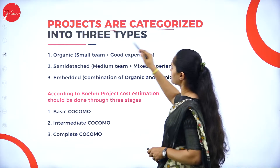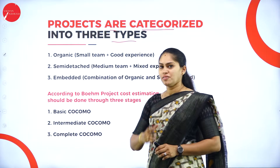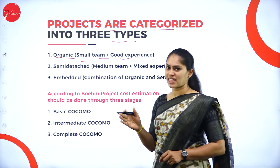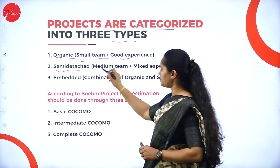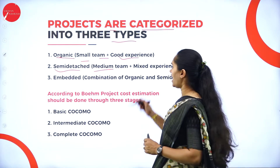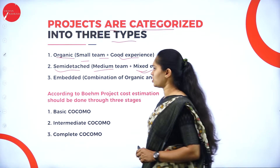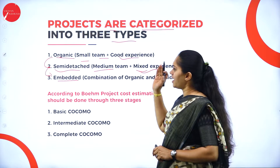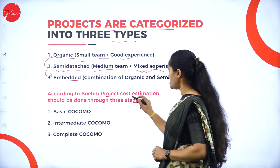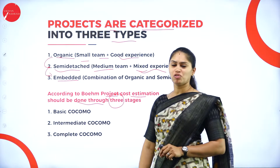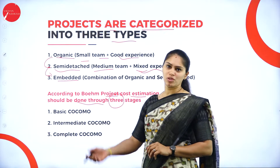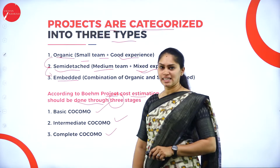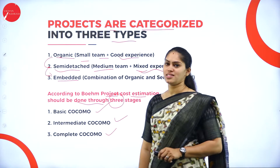When it comes to the COCOMO model, we have three kinds of projects. One is the organic project — helpful for a small team with good experience. Next, we have semi-detached — convenient for a medium project and medium team, and mixed experience is also okay. Then we have the embedded one — it will be a combination of organic as well as semi-detached. As per Barry Boehm, project cost estimation should be done through three stages: basic COCOMO, intermediate COCOMO, and complete or detailed COCOMO. With the help of these three stages, we can estimate the cost of a project.